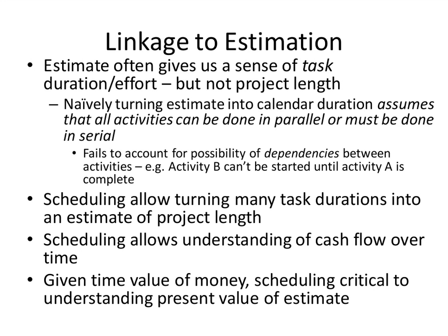And suppose we have 4 developers working on this. In terms of calendar clock hours, maybe these are days. Let's just say days. It's a long sprint, but say days. Suppose we have 4 developers. What's the minimum time in which we can deliver on this? We have 40 developer days worth of work. 10 days. Okay, 10 days.